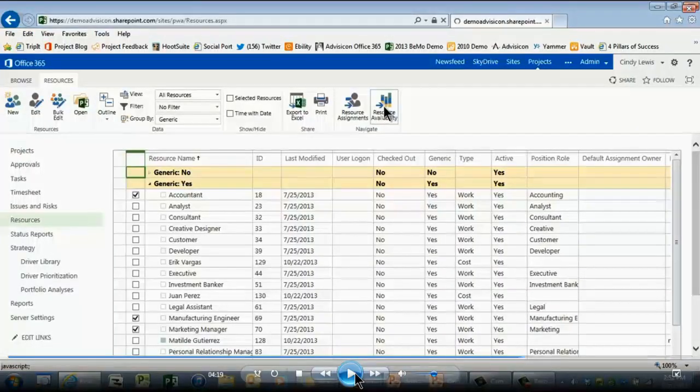My question is that we use timesheets, and whether or not you could actually book time to tasks or assignments made in the resource plan. Yeah, thank you. The answer to that is no, and it's by design. Because the purpose of the resource plan is high-level planning, they assume you're not ready, and there are no tasks actually in the resource plan. So if you want something to go against a timesheet, you do want to get down to the schedule level. But we're going to show you in a few steps ahead another alternative that you might use instead. So thank you for that question.